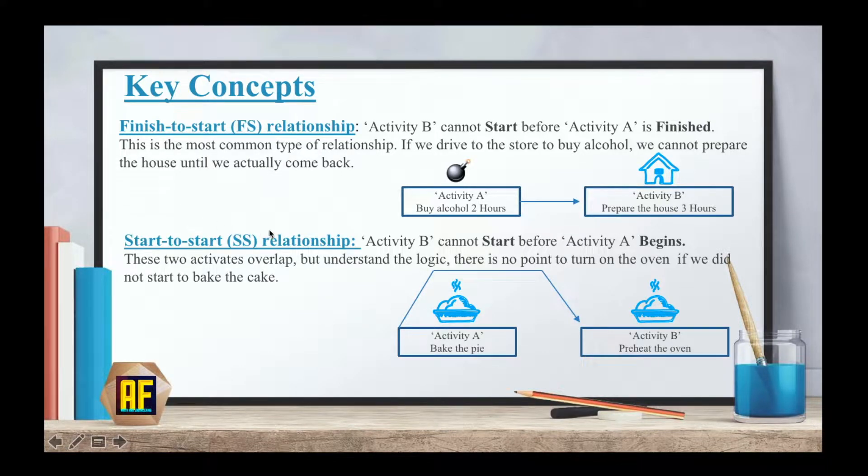Start to start relationship. Activity B cannot start before activity A begins. These activities overlap, but understand the logic. There is no point to turn on the oven if we did not start to bake the cake. Just think about it and you'll understand the logic behind it.